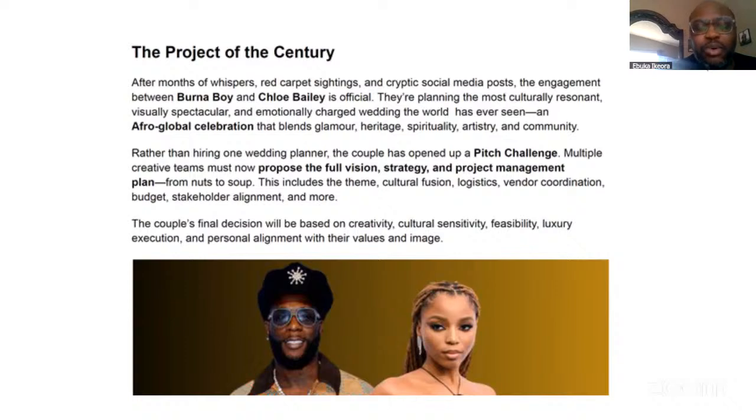Why is the date important? The vendors you're going to get involved in the project, the people you need, and how to get your actual cost estimations are very important, because it's going to affect your budget. For example, if you choose December 25th, that's Christmas Day. Are the vendors you're going to work with going to be available for that date? Which will also have an effect on your budget. Should I continue? Yes. Okay.